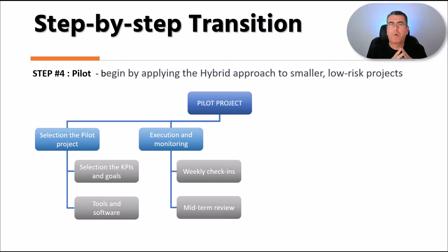In the hybrid approach, you can define the duration, the timeline, the time box that you're gonna use to monitor your project status. I suggest you not be too long, but not too short. You can do some weekly status, you can do biweekly status, but try to get some control over the activities to have time to take some actions if something happens.